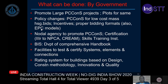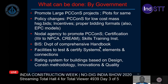Since precast concrete construction is an integrated concept from design through manufacture to erection, the EPC model rather than the item-rate model would be more suitable for larger contracts. A nodal agency needs to be formed for promoting the precast concrete system, for testing and certification, and for developing skills training institutes for labor and engineers — similar to NPCA in the US or CREAM in Malaysia. BIS is also interested in developing a comprehensive handbook like the PCI handbook. Proper facilities are needed for testing and certification of systems, elements, and connections, and existing buildings done with precasting can be audited to check on design quality.